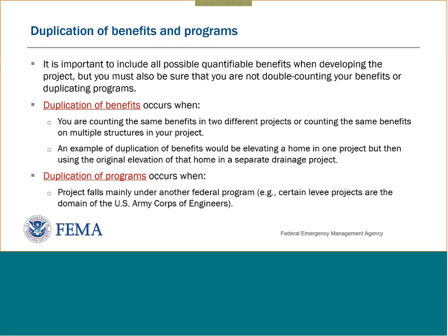Well, we couldn't do that, but we figured out a way to spread the benefits out across the entire structure. So for one grant, we knew what the benefits were because we knew where the work was taking place on the structure, and the same for the other grant program. You can only count the benefits from that part of the structure that you were mitigating, for example.